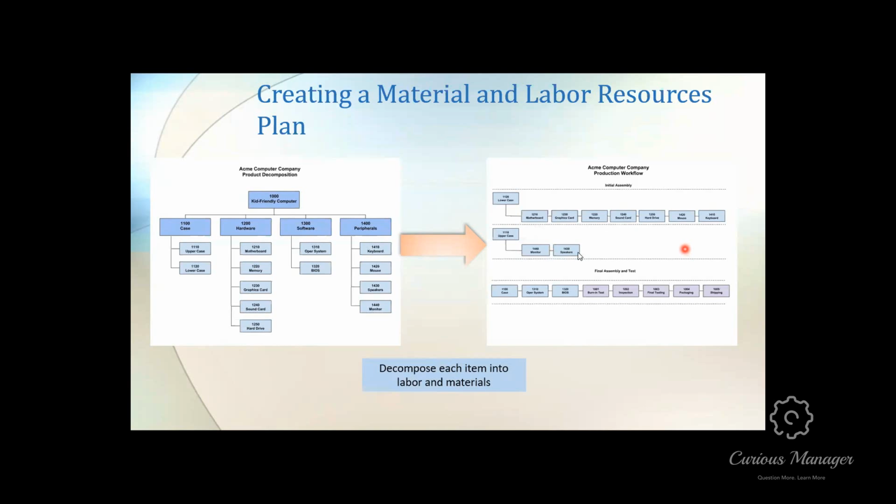So then all of those can be placed into either a work breakdown structure if you're doing project management, or a manpower allocation structure, something that is used for identifying manpower needs across a certain process or a certain thing. So you can do this. In this regard, let's say that we had just built this final assembly and test procedure. What you could do is you could flow out all of the different people in a swim lane. Then you can connect the swim lanes together to see how the manpower can be allocated between processes.